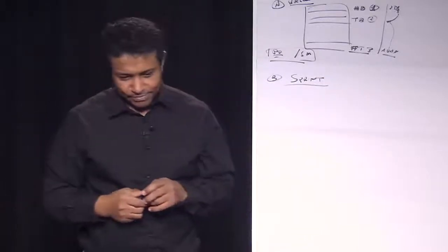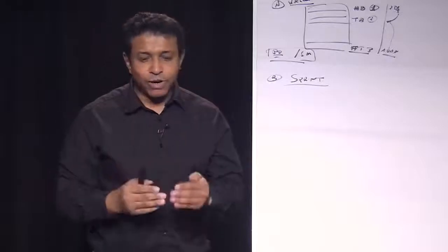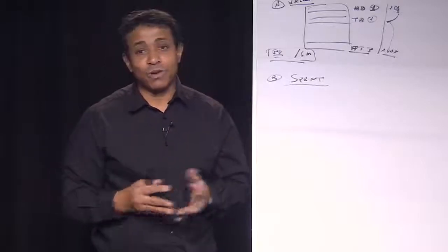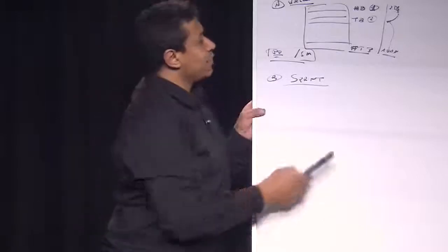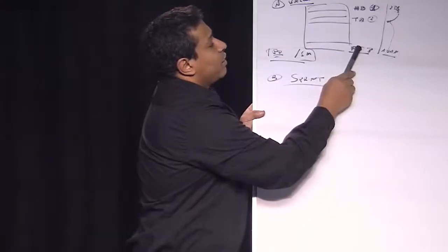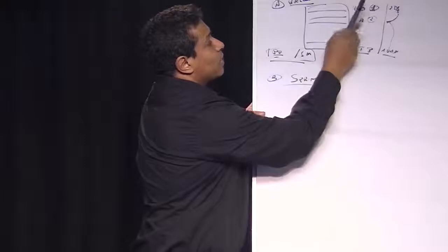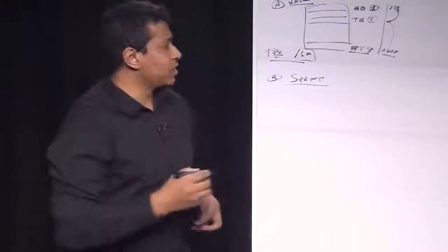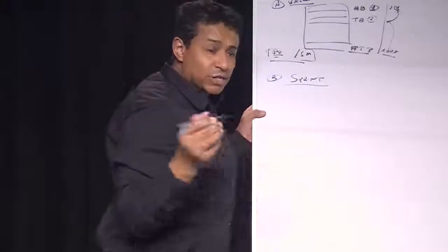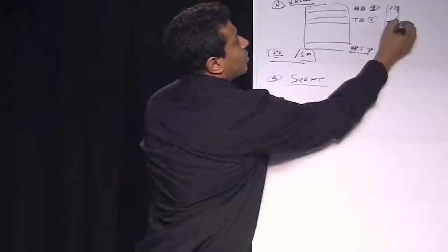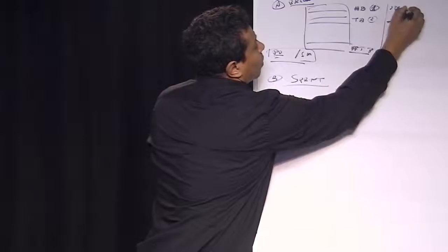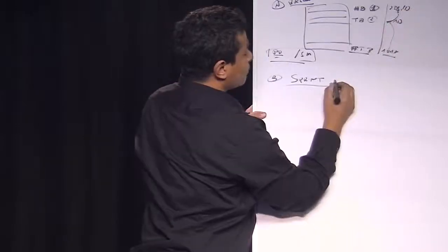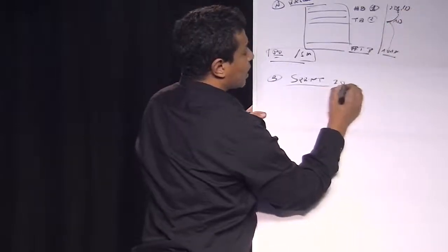Sprint is a way to do my retrospective to the product owner. It means I have an order now: footer, toolbar, header. How much time is it going to take? With my engagement as a Scrum Master, I said 1 day, 1 day, 1 day. So I got a sprint of 3 days.